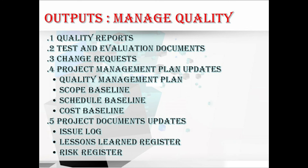Test and evaluation documents can be created based on industry needs and organizational templates. Regarding change requests — if any changes occur during the Manage Quality process that impact any components of the project management plan, project documents, or any project or product management processes, the project manager should submit a change request and follow the Perform Integrated Change Control (PICC) process.